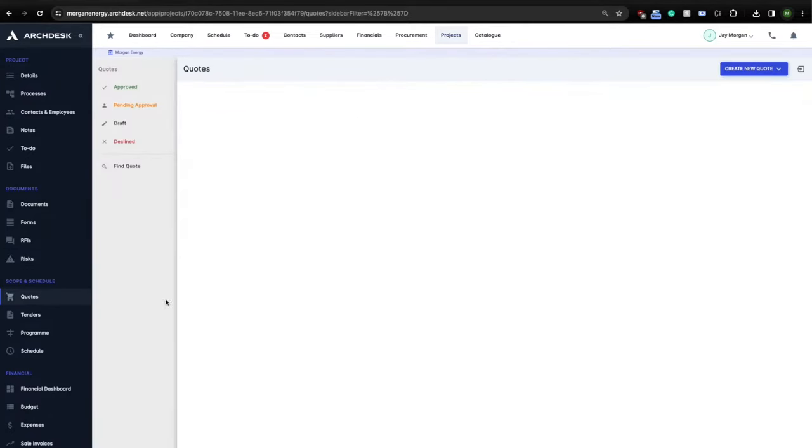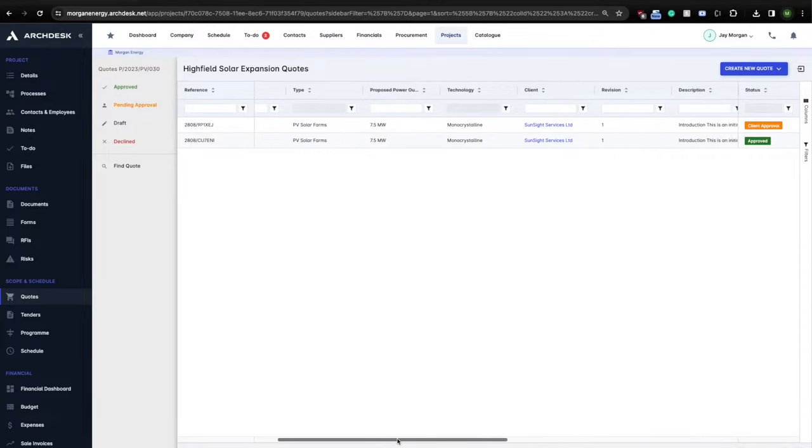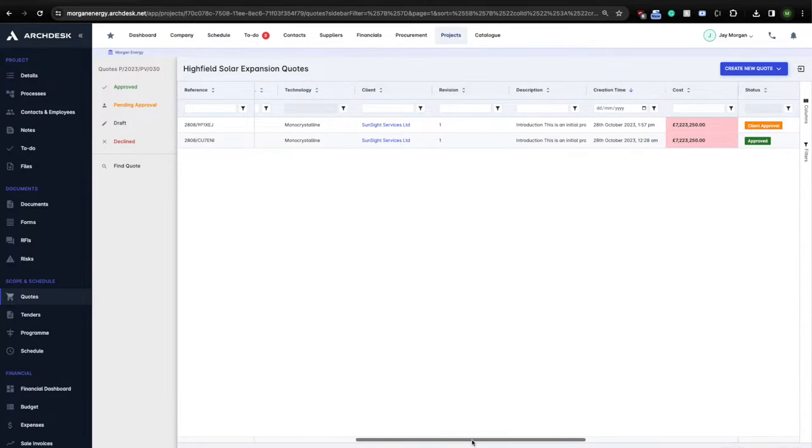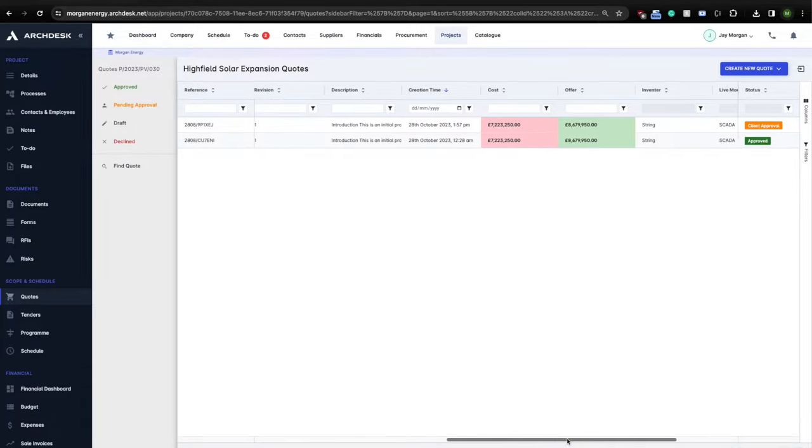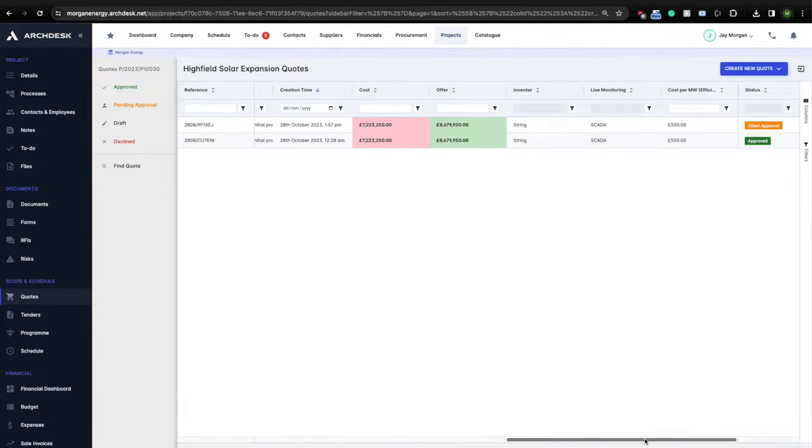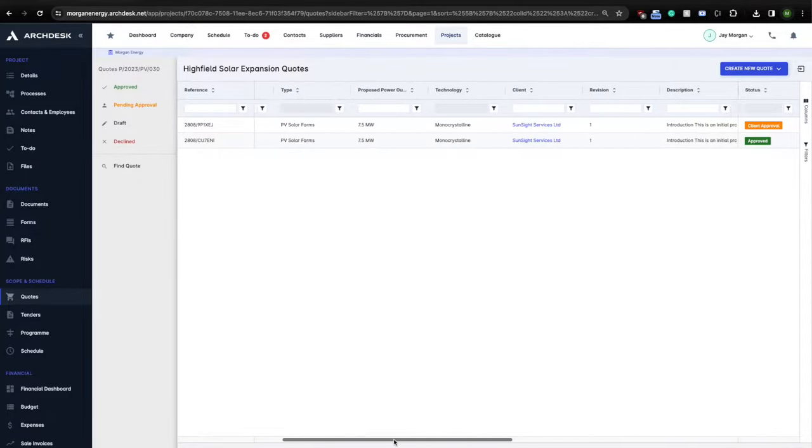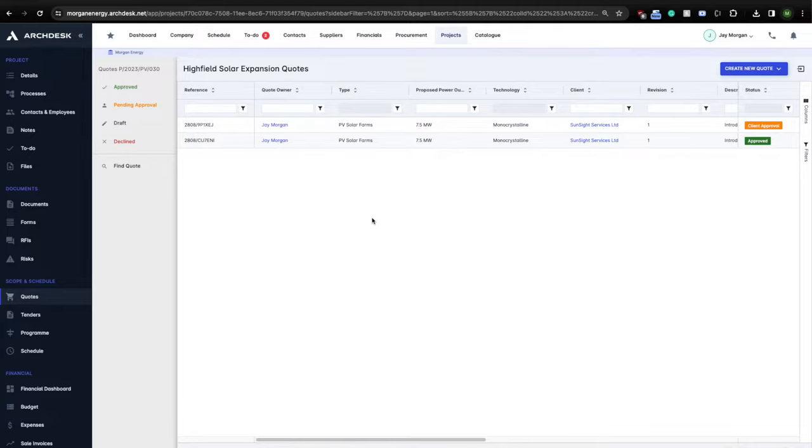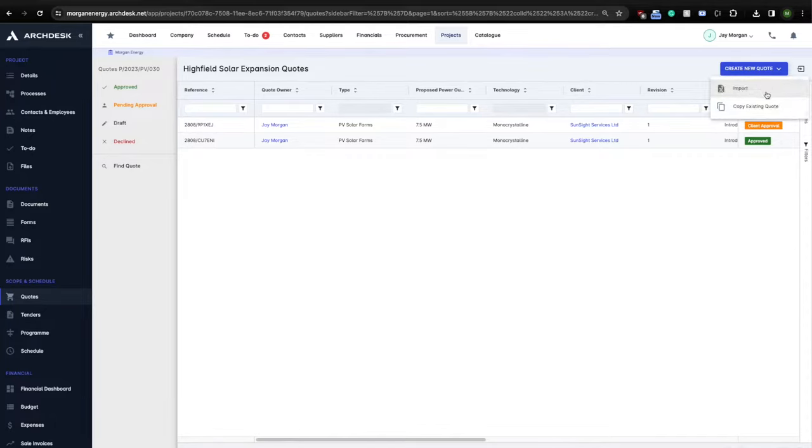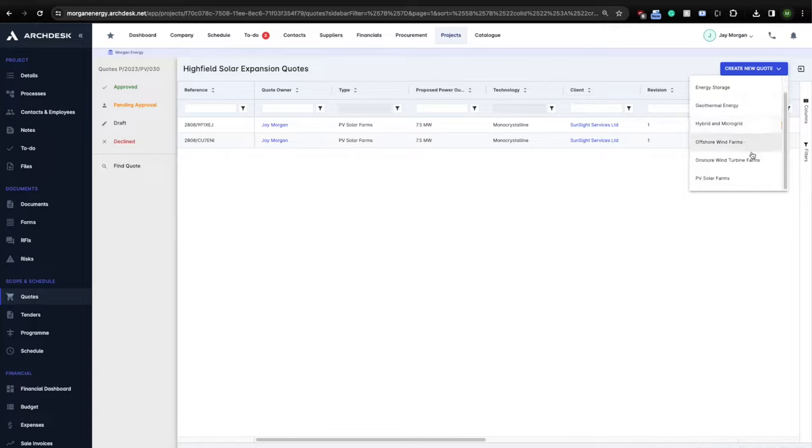Let's now take a look at ArcDesk quotes module. You also might use terminology such as proposals, bill of quantities, bill of materials or simply packages of work. This is one of the most fundamental and powerful modules in ArcDesk as it contains effectively the scope of the whole project. That's really where all the magic begins. Once your project is initiated, you will most likely start off here by building your quote, which then becomes the scope for scheduling, cost control, procurement, application for payments and the whole project lifecycle. You can import quotes from your existing Excel estimation sheets or you can build advanced estimating systems directly in ArcDesk to cover all the different project types.